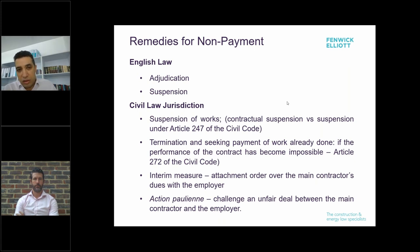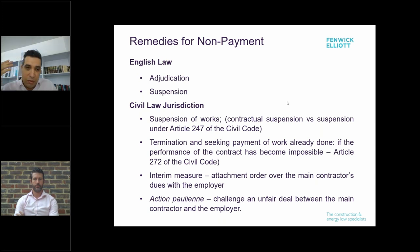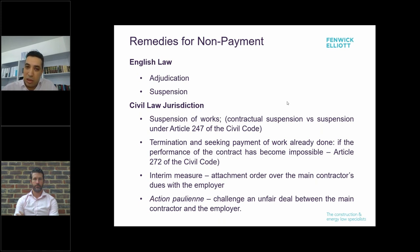Pay-when-paid clauses are not usually linked in any manner to suspension rights. This means that even if the employer is in a position to justify non-payment by saying they have not received payment from the employer, this justification is acceptable from a payment point of view but should not affect the subcontractor's right to suspend the work in the circumstances. That is the first self-help remedy action that can be taken by a subcontractor.